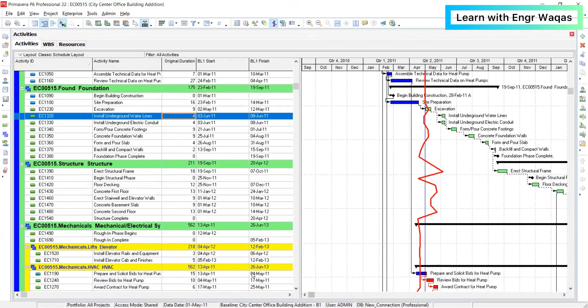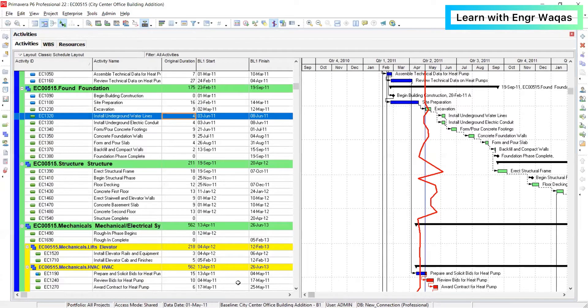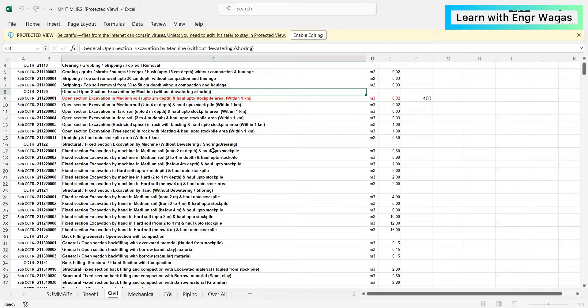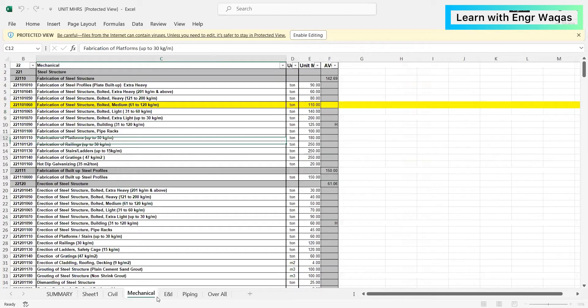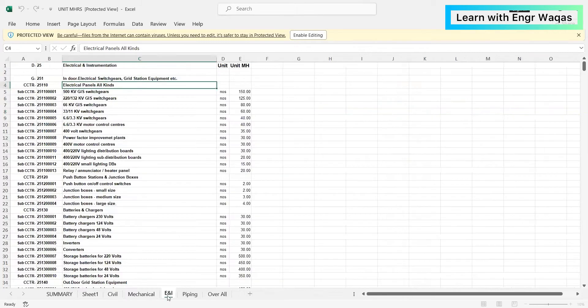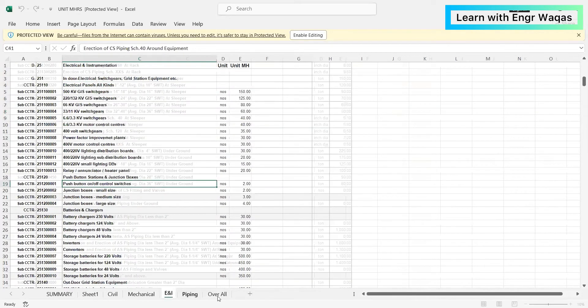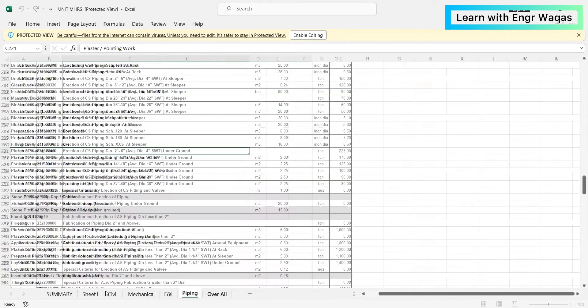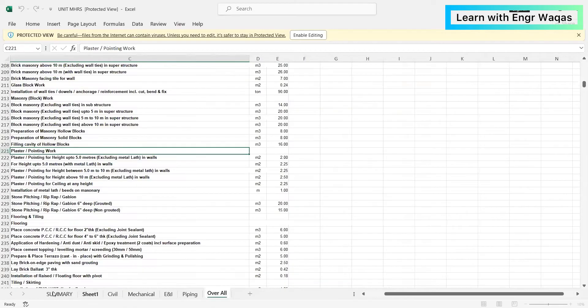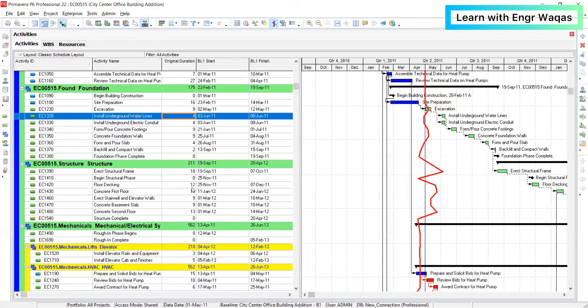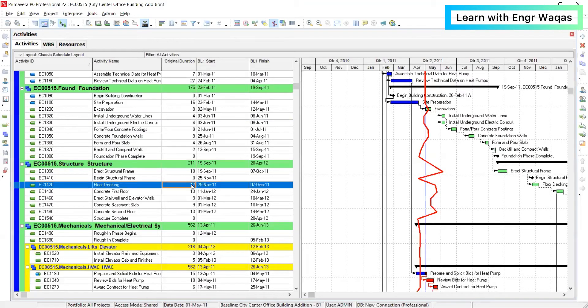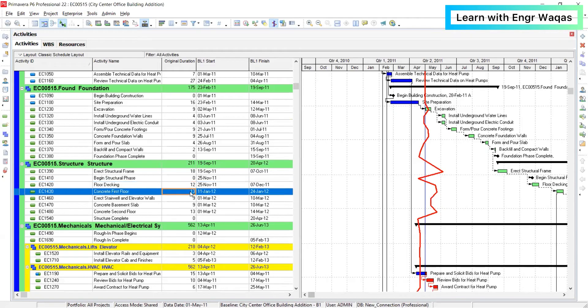For that, I have to define here the productivity sheet. Here you can see that there are man-hour sheets for civil works, there is a man-hour sheet for mechanical shutdown works, there is electrical and instrumentation works, there is piping works, there is an overall sheet, there is a summary sheet. So every activity actually has already been documented: how we can define their duration on the basis of their work quantum.